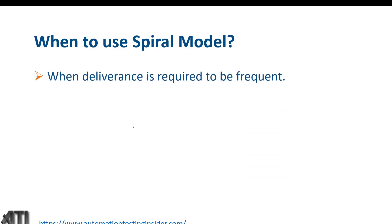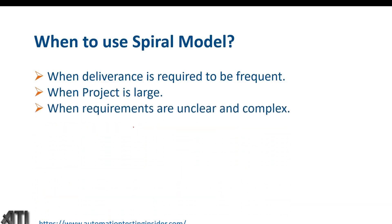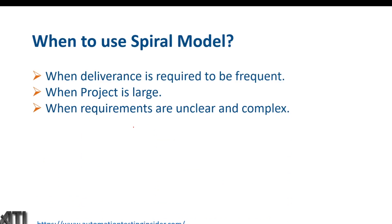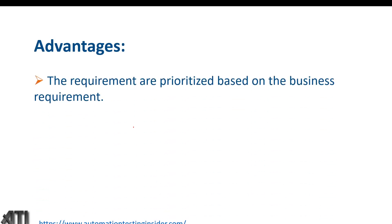When should we use spiral model? When deliverables are required to be frequent — when we get frequent requirements from the customer. When the project is large. And when requirements are unclear and complex, we should go for spiral model, because this model has high risk analysis and we can incorporate requirements in the middle as well.